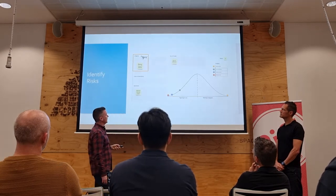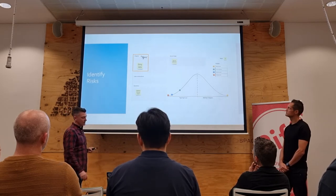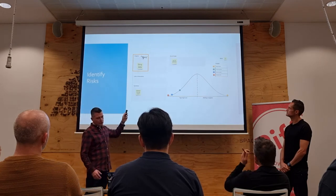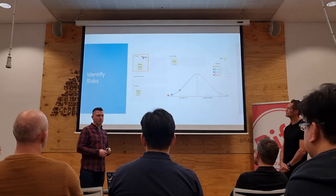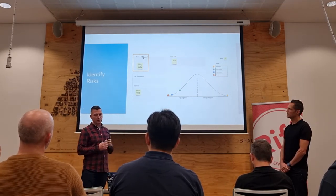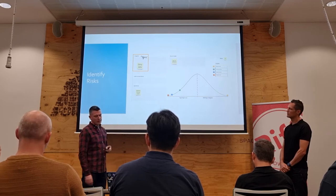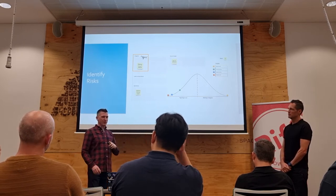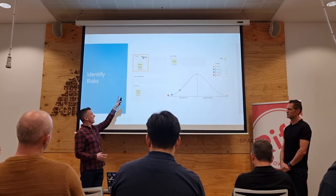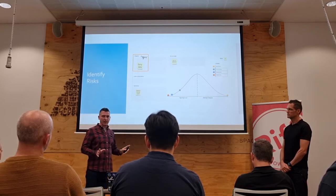So let's just zoom out a little bit. There are actually a few other things on our hill chart, what we call our board. Here we have identifying these. We call them dragons to slay. Shape Up calls them rabbit holes. The team has called out dirty data as a dragon. We could create a shiny new target state for this solution, but we know there's some dirty data to be migrated. We're just not sure of the scale. We haven't qualified or quantified it, so it's still a big unknown for us until we actually slay that dragon. We're not going to be comfortable about that thing.